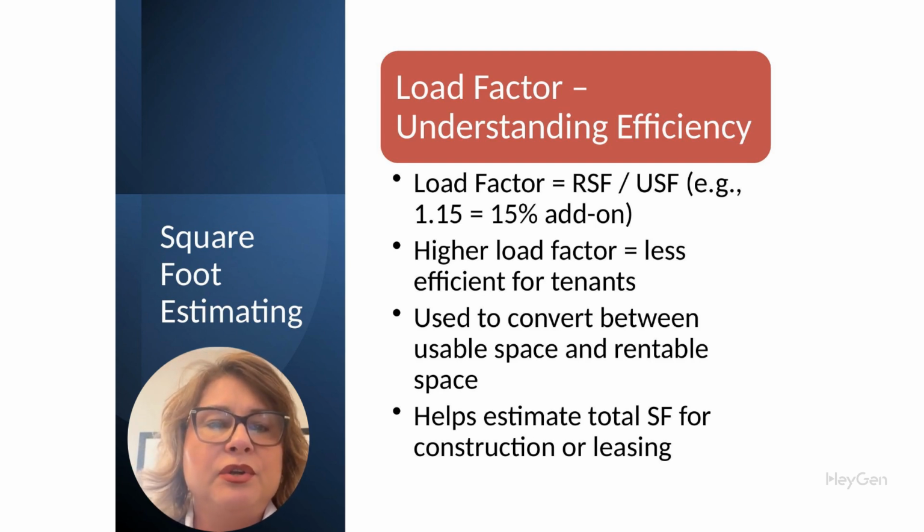For example, if you're told a tenant needs 20,000 square feet of usable area and the load factor is 1.25, you know they'll be renting 20,000 multiplied by 1.25 equals 25,000 rentable square feet.